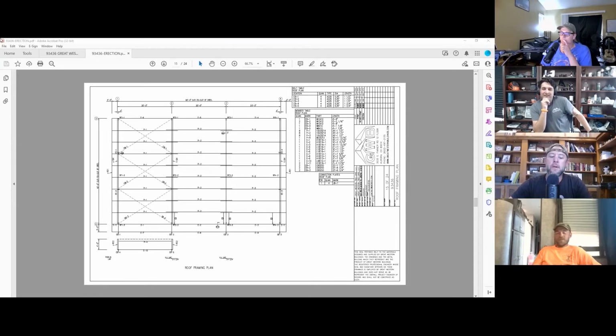Did you pull your own permits? I have to ask. I actually never asked that, because I get customers that ask me that all the time. No, it's commercial. Chad had to have a GC. For a residential build, you don't have to have the GC. Yeah, no, and Lee was good people.